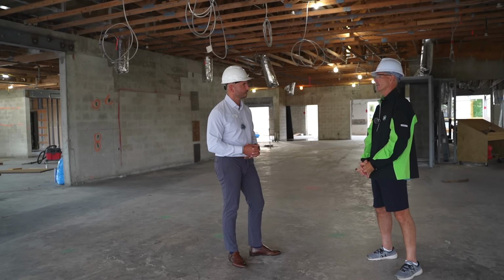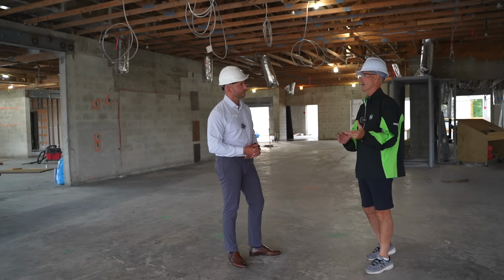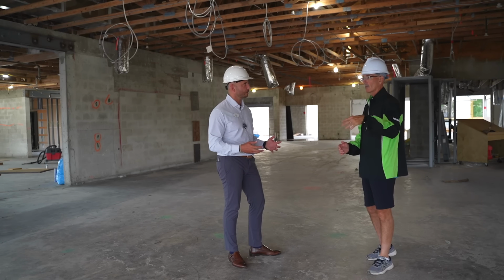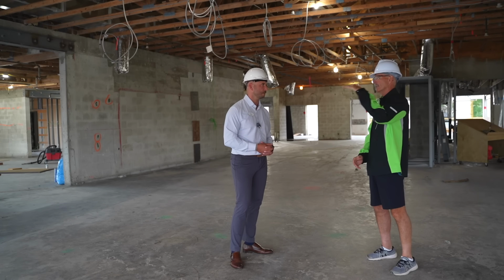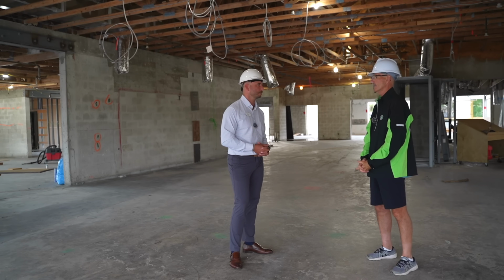We have over $1 million in that work. The pool itself is maybe $600,000. The patio is several $100,000. The fencing, the planting, the equipment, the electrical work so we can have musical performances and you can run a buffet and all that. So it's quite an intricate area of the site. There's kind of a ramp sidewalk that goes up to it. There's some low walls. A lot of work there.